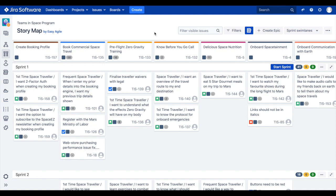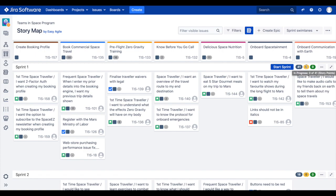Perhaps one of the biggest considerations for a team when planning their sprints or releases is their capacity and ensuring that they're not over committing. At the end of each sprint or version swim lane on the story map, we have estimation lozenges. These lozenges show an accumulation of the estimated work planned for that sprint or version in each of the three status categories: to do, in progress, and done.